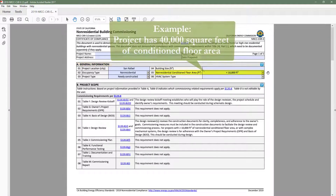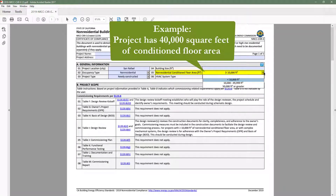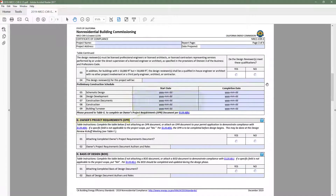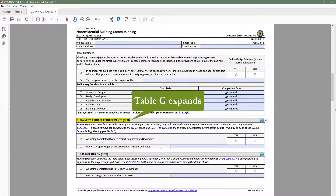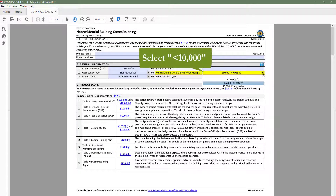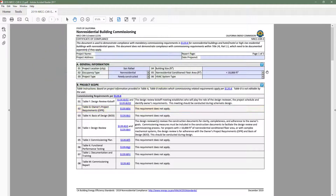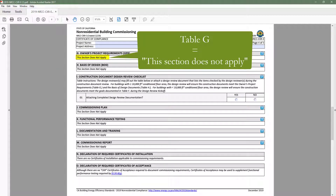For example, if our project has 40,000 square feet of conditioned floor area, we would select the appropriate range in Table A, and as a result Table B triggers multiple commissioning requirements including owner's project requirements. If we head to Table G, the owner's project requirements row in Table B now indicates this requirement does not apply, and Table G is no longer expanded but rather indicates this section does not apply.